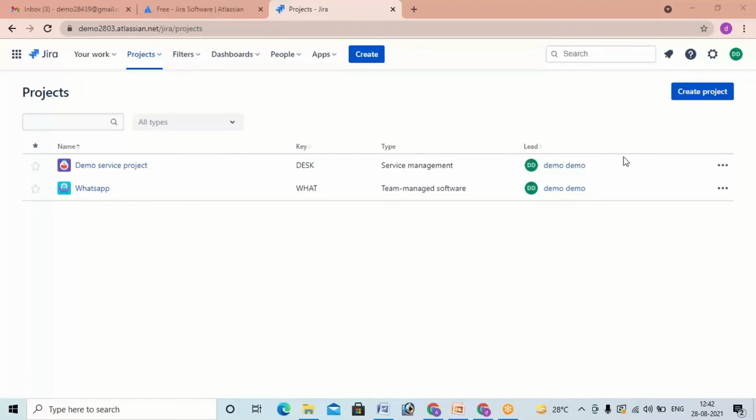So before accepting that, you are going to check whether it is a defect or a new one. If it is a defect, you are going to directly pass that change request to the technical team, so that the technical team can fix that particular bug. But coming to the new requirement, in that case you have to inform the senior person, saying that the client has requested a new requirement.